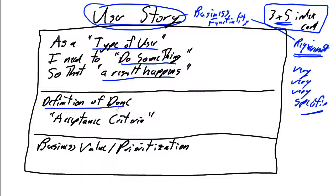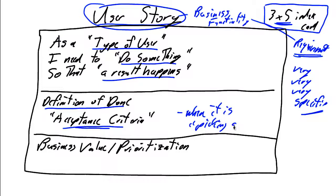The next part of a user story is the definition of done. We will determine this user story — where a warehouse clerk can find a product in the inventory so that it can be shipped to a customer — is complete when the acceptance criteria is met: we know where it is, i.e., a picking slip is produced. And finally, we identify the business priority. This is a high business priority with a priority of eight. We use these prioritizations to pick the next most valuable set of user stories from the backlog to put into the sprint.